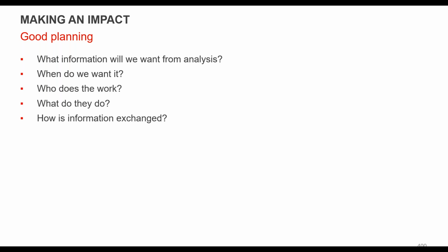So what does it look like from a planning point of view? And we've talked about this all day yesterday and today as well. First off, understanding what you're trying to answer with the analysis, right? So framing the goal, what question needs to be solved. And then within your team, and every team structure is a little bit different, doing resourcing: when does the client need it by, working backwards, who's doing the work, how many people, who's doing the review, how are you gathering the information, right? So set that up with the client ahead of time to understand who is going to be doing the data collection, how you're going to be getting what you need.